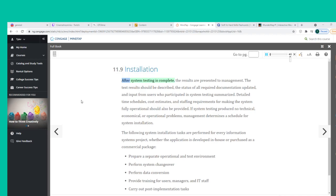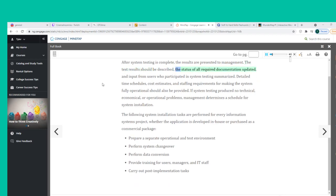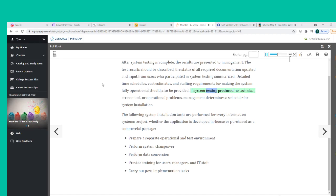After system testing is complete, the results are presented to management. The test results should be described, the status of all required documentation updated, and input from users who participated in system testing summarized. Detailed time schedules, cost estimates, and staffing requirements for making the system fully operational should also be provided. If system testing produces no technical, economical, or operational problems, management determines a schedule for system installation.